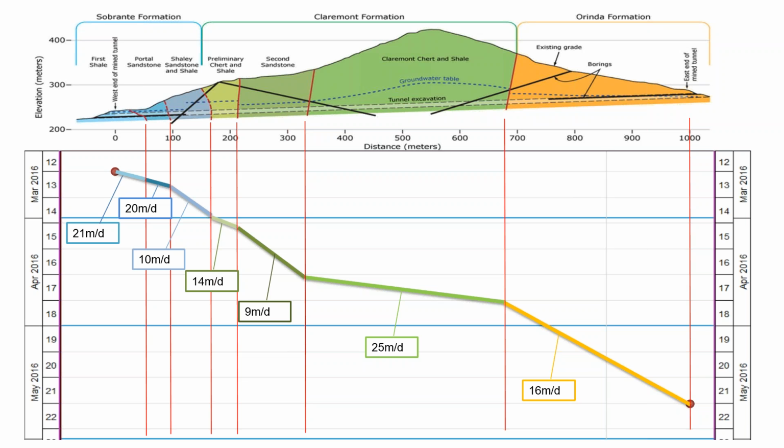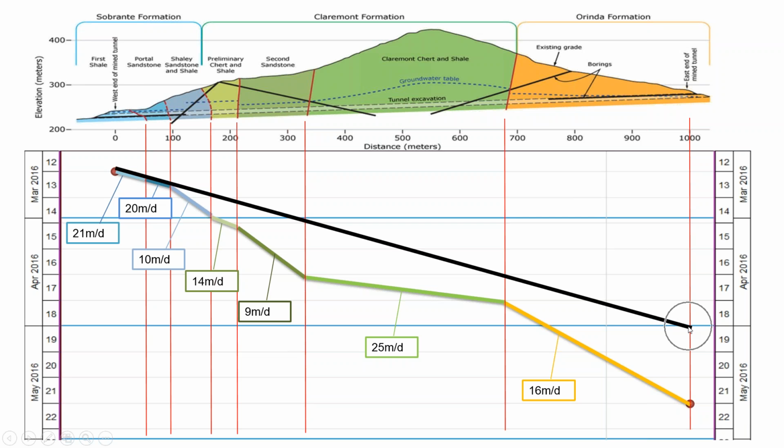That's why many tunnel projects are majorly delayed, because of delays in tunnel design works, procurement, and delivery. It is very important to know this risk, because if we have that kind of expectation when we make the offer, starting from zero and coming here, the time between this point and this point is the delay of our project. So that is 1, 2, 3 weeks of delay. Delay means extra cost. Delay means losing respect. Delay means penalty. So this is very important. We use the system in the early phase of project planning.